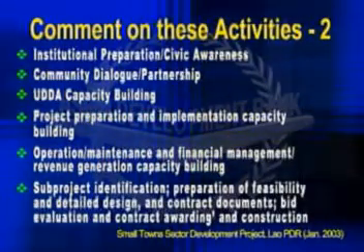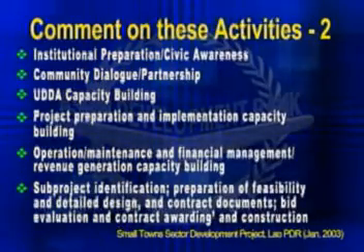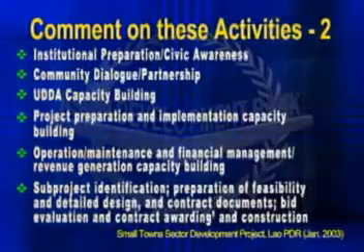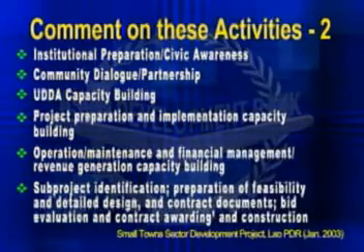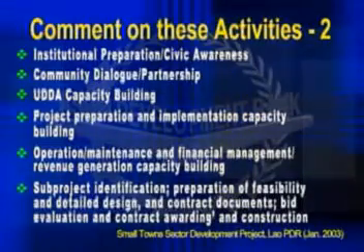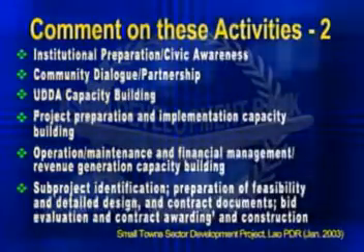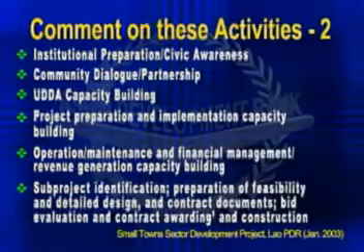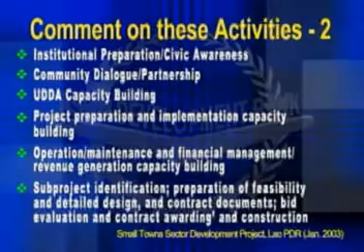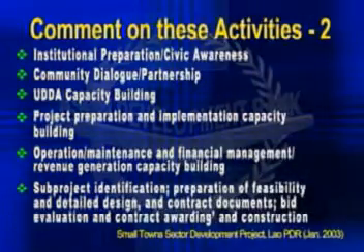My comment on these activities is that the last bullet point captures the essence of the activities in a sector loan. Under a sector loan, there are a series of steps that have to be completed, including sub-project identification, preparation of feasibility and detailed design, and so on. And it is these activities that would form the main milestone events. And they would be accompanied, of course, by time-bound targets and indicators in the next column. The other points are really activities which could be fitted under the sub-project identification, preparation, and so on. Of course, it goes without saying that these activities should be numbered according to the outputs to which they will contribute. As a third set of activities, I've chosen those from the Afghanistan Agriculture Sector Program Loan.